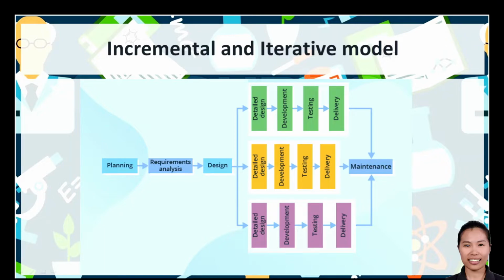So with iterative development software, changes on each iteration evolves and grows. As each iteration builds on the previous one, software design remains consistent. As software is delivered in parts, there is no need for a full specification from the project's start, and small changes to the requirements are possible in the course of development process.